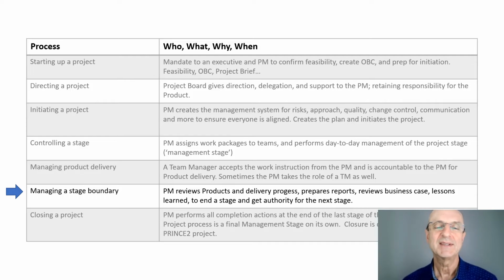The process of managing a stage boundary is done by the project manager, who consolidates all of the information during that stage and then packages that at the end of that management stage for the project board to examine and assure and approve that the project can go into its next management stage or can go into closing off the project.